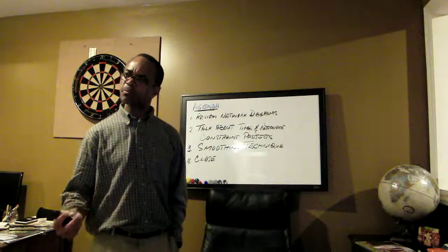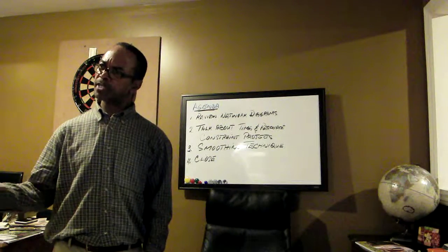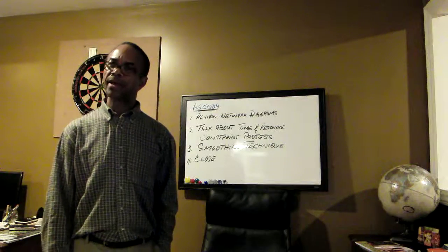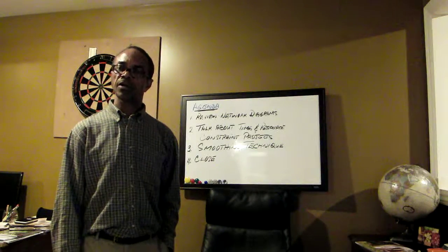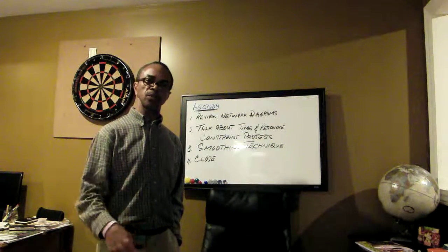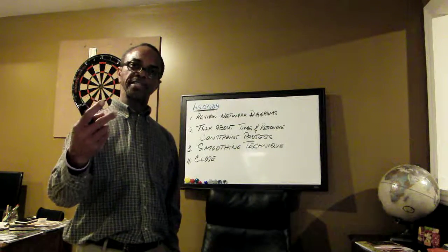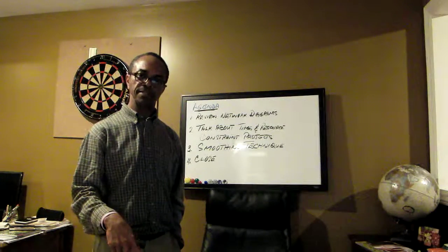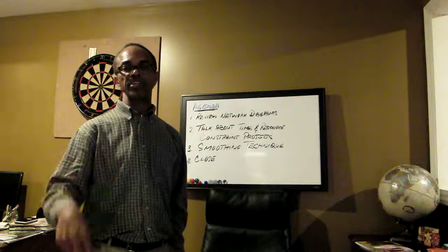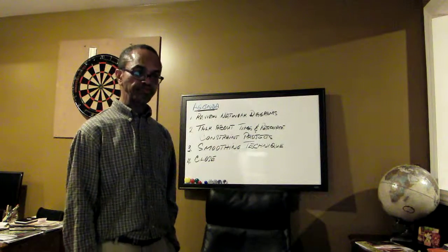Right? Can anybody else tell me what's the formula for calculating slack? That's correct. It's the difference between either your early start and your late start, or your early finish and your late finish.